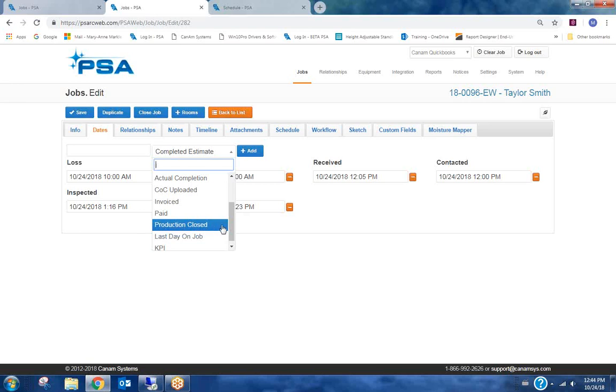The project manager at that point should be reviewing the job, making sure that there are no last minute bills that came in from any sub-trades or materials, and that the gross margin percent looks accurate and complete. That's an indicator for those of you using PSA Desktop that you could do an actual closing on that job and process it through your WIP process.